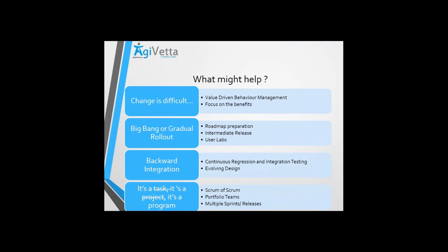But if you have a portfolio of products, multiple products or multiple modules working together, there has to be a team which is working above all these products, giving the product owners of these various products or modules insights into how the overall release should go, how the overall product or solution should go, what could be the roadmap at an organization level, what could be on a release level. So portfolio teams work at one level above all the product owners and release teams or multiple module teams to give the overall portfolio vision and work on aligning the business vision and strategy with the product or the portfolio that you're working on. So that's what I mean with the portfolio teams.